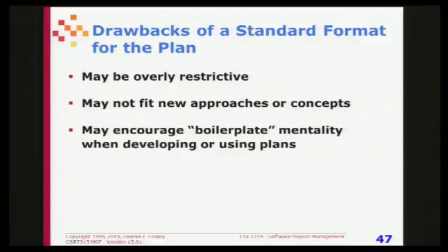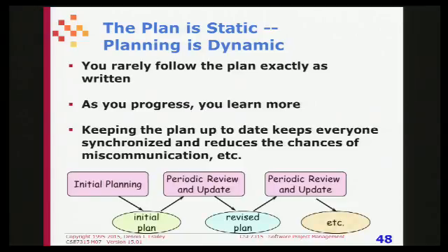So that's what I call boilerplate mentality. The tendency to think that once you've done a good plan, that applies to every project. That's not necessarily true. Okay. The plan is static. The planning process is dynamic. So you need to plan to update your plan. That should be part of your plan.